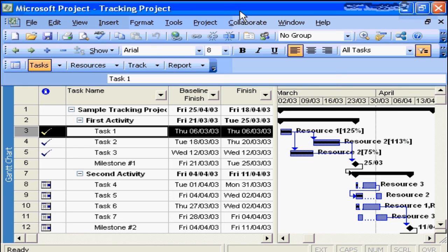This concludes our nugget on using Microsoft Project to track and manage projects. The key is you need to enter the actual details from the timesheets from your team members into Microsoft Project. You need to accept the facts from the team members, the work actually completed on the project on a week-by-week basis, and the team members' revised estimates to complete, the actual work they believe it's going to take to complete the project tasks. You enter that information into Microsoft Project, and you assess the impact.